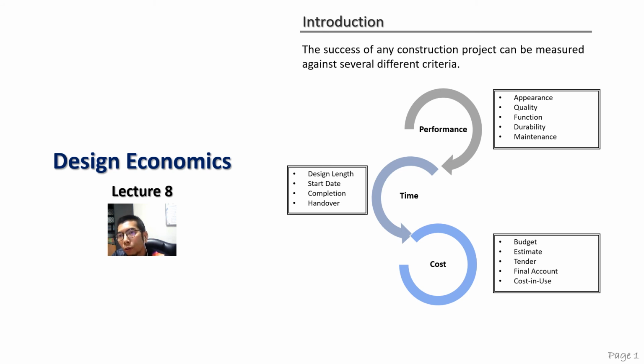The consultant says, roughly the estimated cost of this 10-story office building will be 10 million, for example. The client will then demand their requirements based on that budget. So it's good to have that particular estimated budget when you want to start your project, so that you will avoid going over budget in your design and so on.